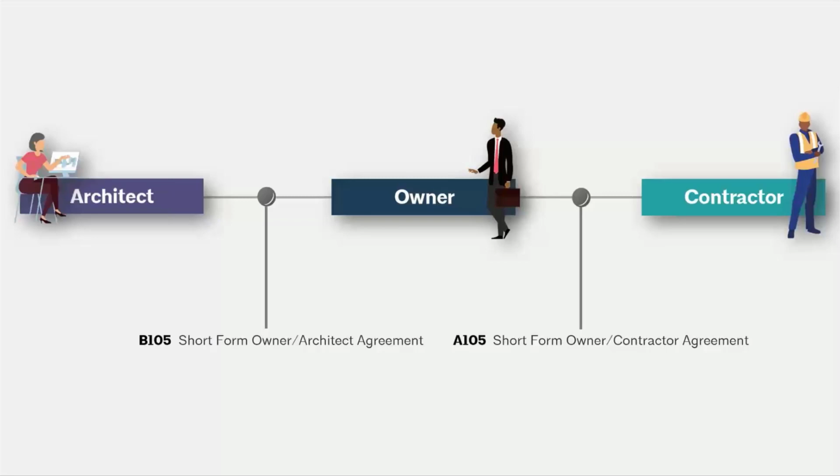It's basically that the parties go to mediation first, and then they go to a checkbox system, either arbitration or litigation, or other. So there is a process laid out. Again, not going to go into a great level of detail, but the medium and the large do have a dispute resolution process laid out, whereas the small does not.